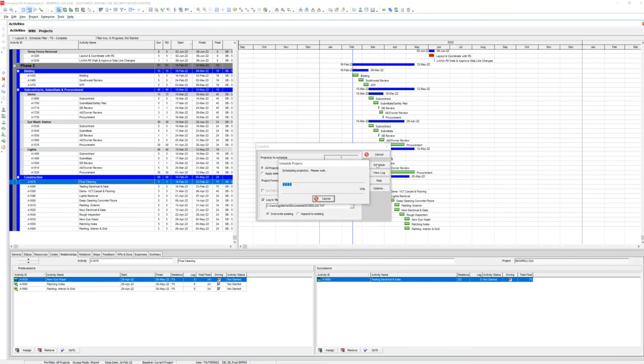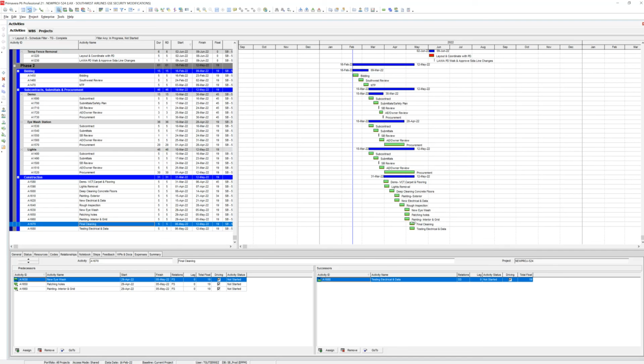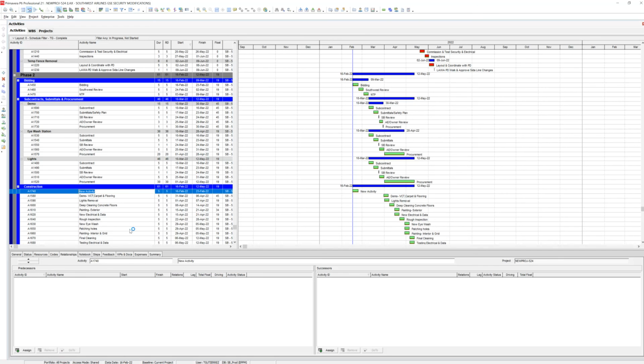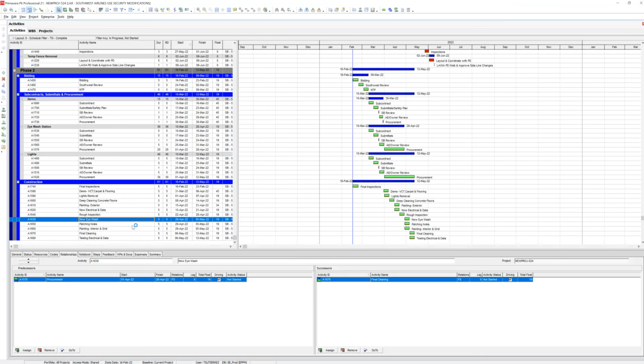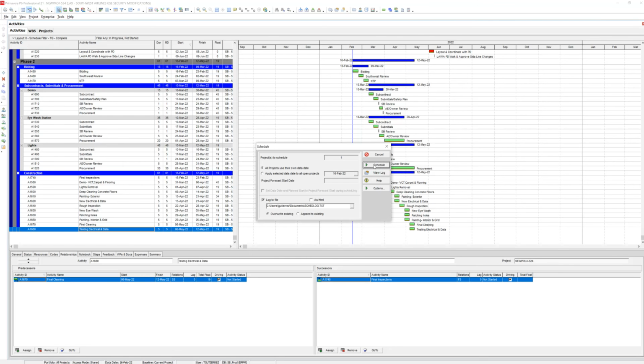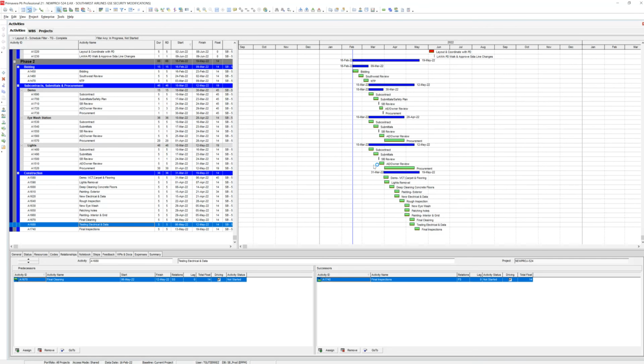So you don't have a final inspection probably, right? But we can add it. So now, your final inspection happens after your testing, right? Insert, where's my insert? Okay. Cool. So now it kind of looks good. It makes sense. So the only thing I have to do now is, every time you add an activity, by default, it just does 5 days, right? So we'll change it now.